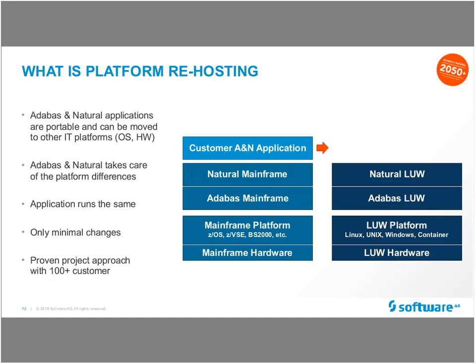So you're going to see changes potentially required if you're doing a search. Something of A through 999 might have to now be changed to 1 through ZZZ. But typically with our customer base, we see only maybe 10% of the code would have to even be evaluated, with less than 1% of that code actually being changed. And again, one of the benefits of that minimal impact is that while this project is going on, you can continue to change and adapt your applications to the current business needs.